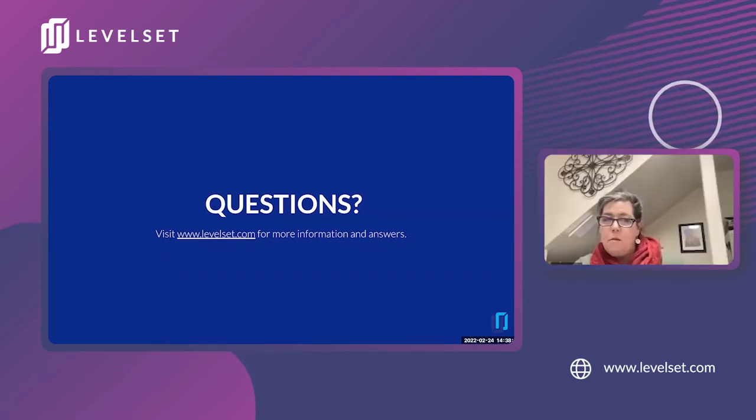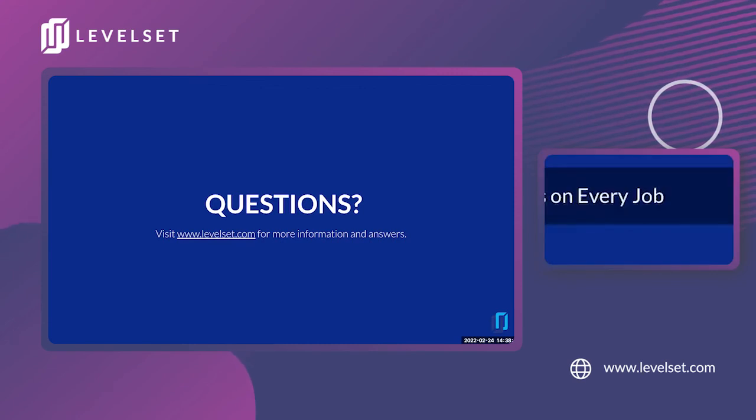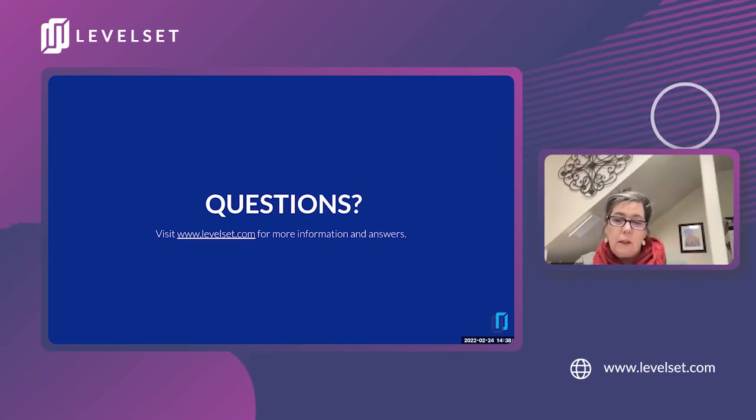Yeah, I don't know where this person lives, but in Arizona, we just have to notify the homeowner. And the HOA is also notified because I'm just being nice and I click that button for them. But Arizona law says it's the actual homeowner. If there's an HOA, they're usually just a management company, and they do have power of attorney to make decisions based on some parameters that are set for them too. Like in our town, it could be that they can do anything with water, or anything up to $5,000 or something like that. But usually homeowners associations, we do deal with, but ultimately the scout will find that the property is owned by the homeowner's name, and then that's who gets the preliminary notice. So there's no confusion as to where it's going.